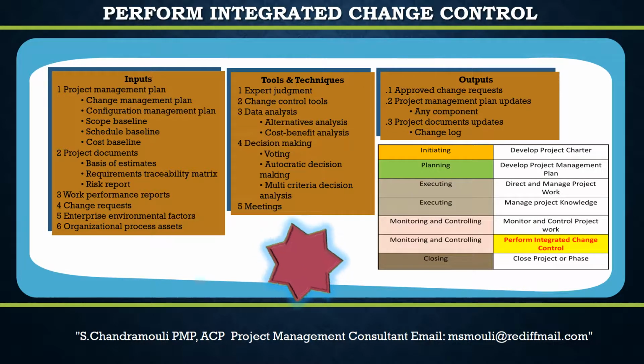Data analysis techniques that can be used for this process include alternative analysis and cost-benefit analysis. The alternatives analysis technique is used to assess the requested changes, and decide which are accepted, rejected, or need to be modified to be finally accepted. Cost-benefit analysis helps to determine if the requested change is worth its associated cost.